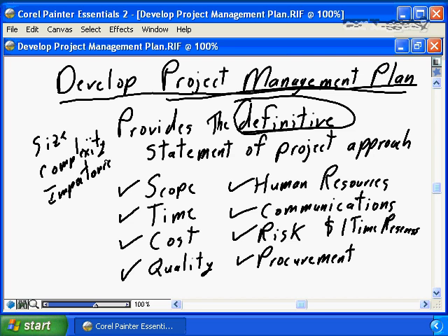of the project. Smaller sized projects may have a 5-page project management plan. Larger projects may have a 25-page project management plan. Very large, very complex projects will not have so much a project management plan, but they will have a separate document that is the scope management plan. And they will have a separate document that is the time management plan, and a separate document that is the cost management plan, and on and on and on through each of the core components of our project management plan